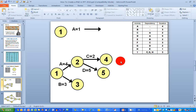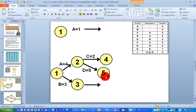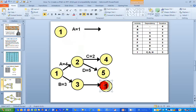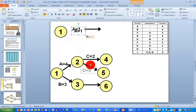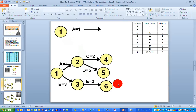The next activity, activity E, is dependent on activity B being complete. Activity B terminates at node number three, so I'm putting in a terminating node for activity E as well — node number six. I add the name and duration: activity E has a duration of two days, so E equals two. So far, we've got the first five activities listed with their start and end nodes.